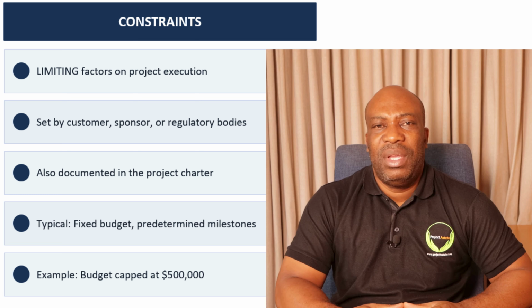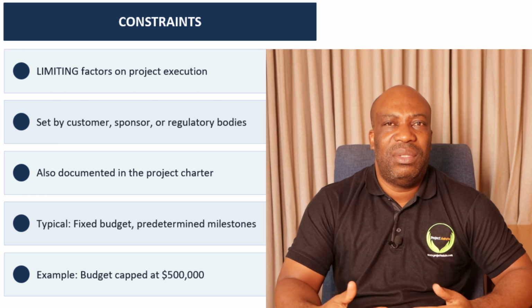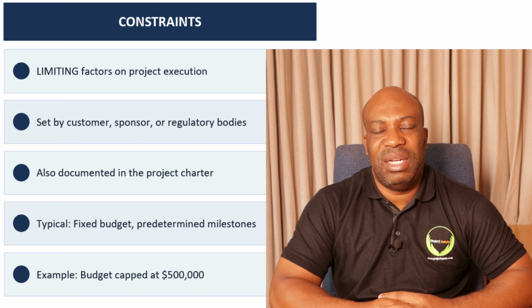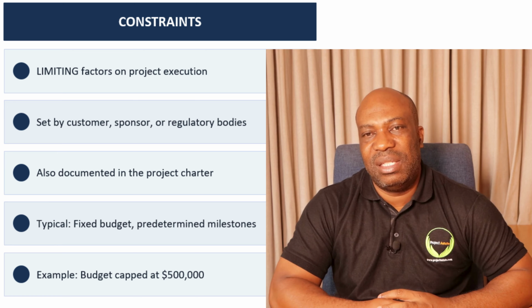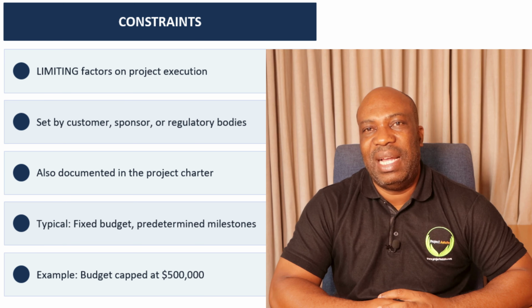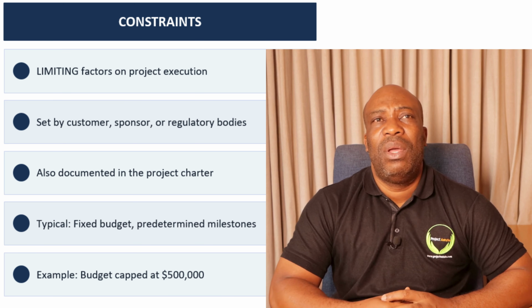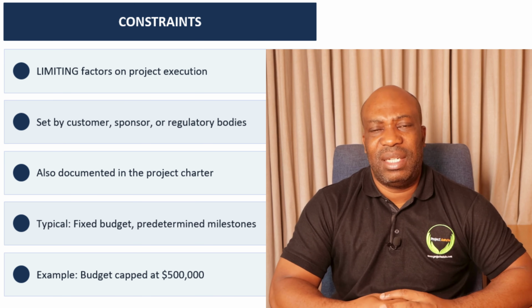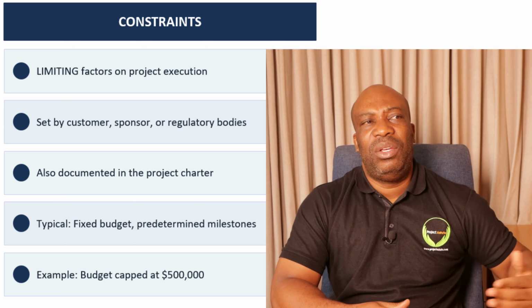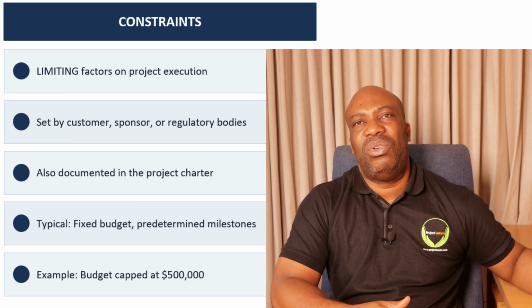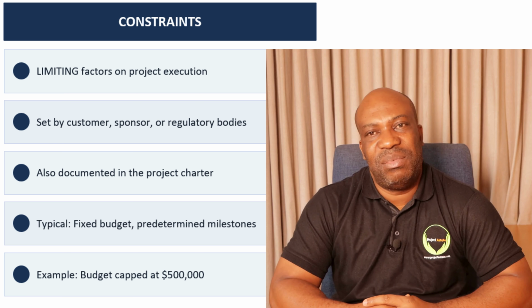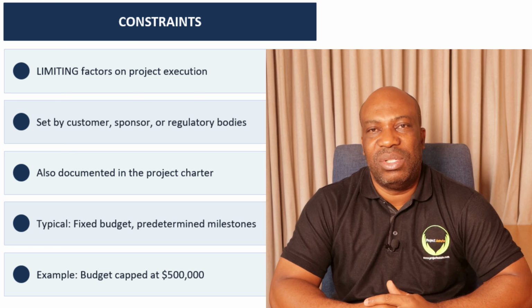They might say this kind of chemical that you might be producing as a product in a project must contain a certain structure. Otherwise, it becomes non-compliant with the regulations. Or even the regulatory body might give a constraint to say your project should not exceed 2 months, or your project should not affect some environmental items or factors that are in consideration.